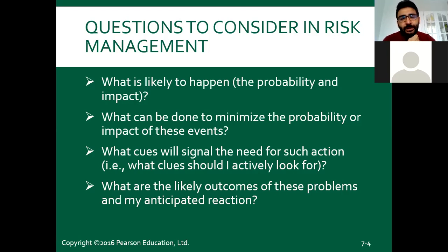What kind of risk did we mention, for example? No one talks about the volcano risk, right? A volcano erupting and killing all of nature and causing damage. It would have a huge impact. Maybe it will kill your whole business, the whole project. However, its probability is very low, so you don't care about this. You don't have a precaution for this risk, and you don't have a strategy for dealing with it. Okay, this is the probability.